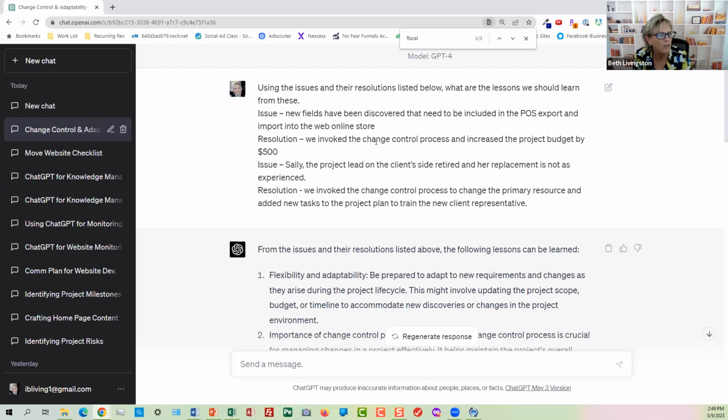My issue was new fields have been discovered that need to be included in the point of sale export and import into the web online store. Anybody who knows me knows where that comes from. Resolution, we invoked the change control process and increased the project budget by $500. Here's another issue. Sally, the project lead on the client side, retired and her replacement is not as experienced.